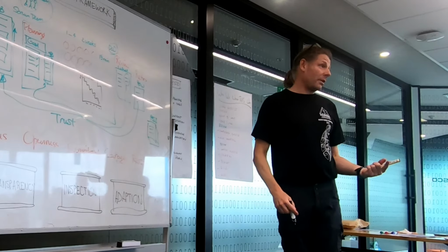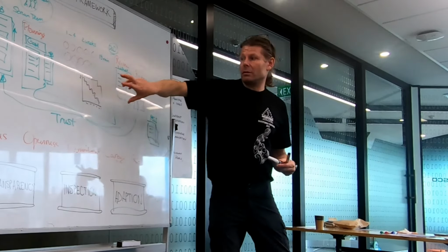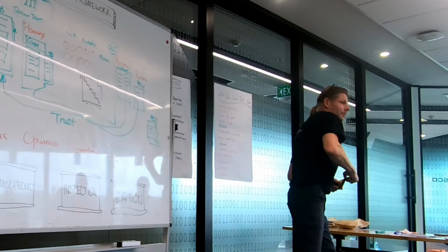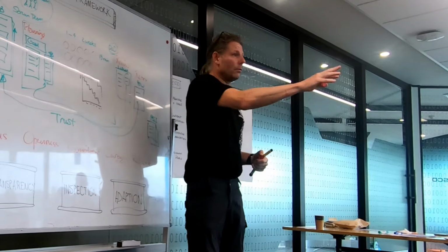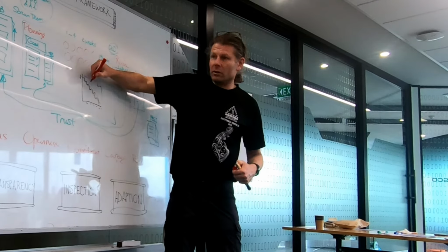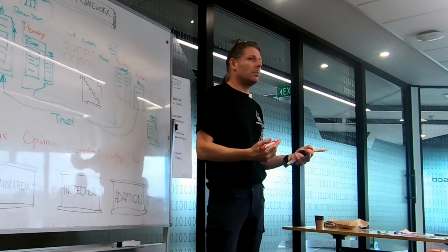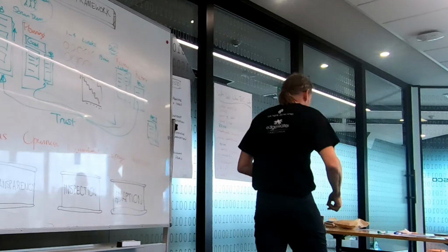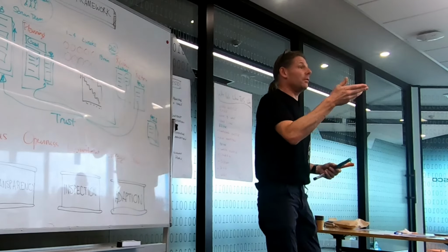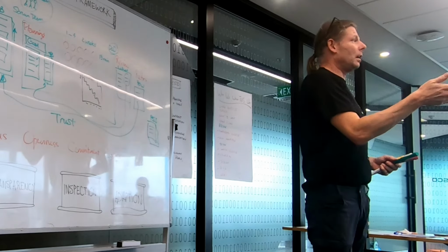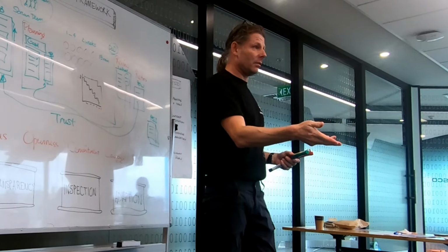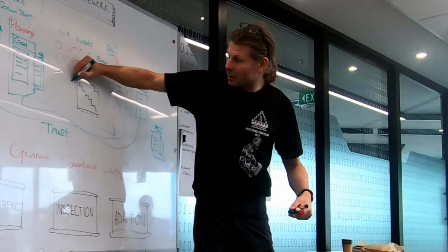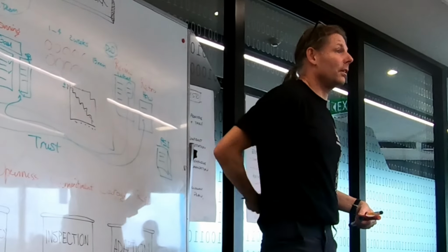So my personal preference is, as well as having the stories on a burn down chart, I would also have hours. So you've got your 40, and I've a YouTube on this, which roughly translates to be about 300 hours worth of work. Now, if you've got a team of 6, and in a 2-week sprint it's 80 hours, 6 people, 480 hours. If you've got 480 hours here, you're going to fail because other things crop up.